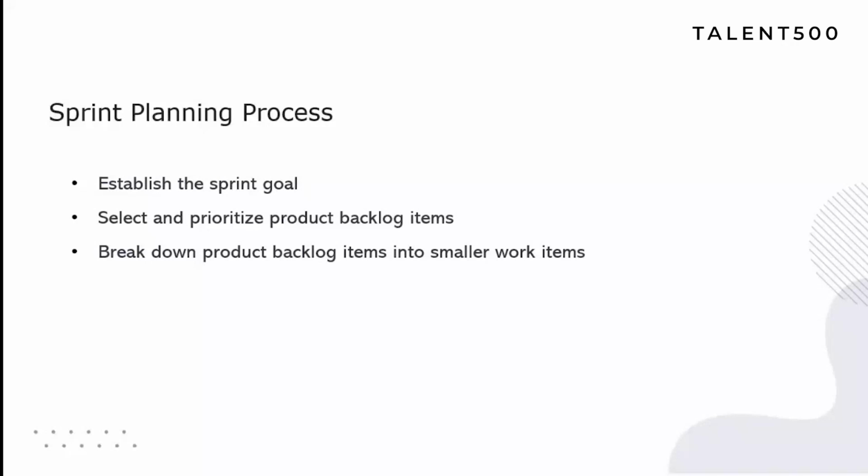For instance, if the sprint is focused on planning a party, just an example, your goal is to host a party. Now you're planning in a sprint for planning a party. It is necessary to decide who would choose the menu, decide the guest list, and purchase the items. By doing this, duplication is prevented, saving us from having to send 5 people to the shop to purchase the item, isn't it? A little planning will help to make sure the team uses their time well.